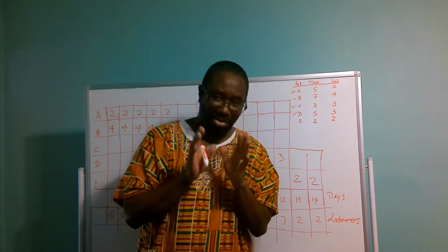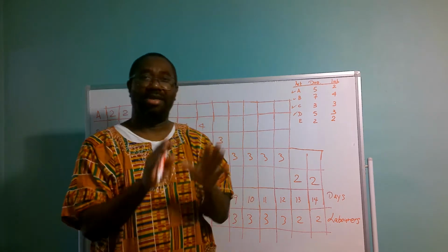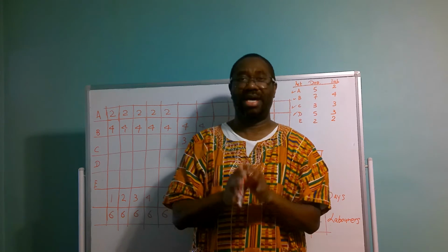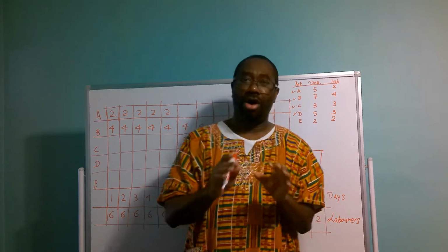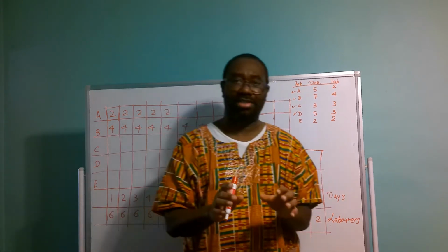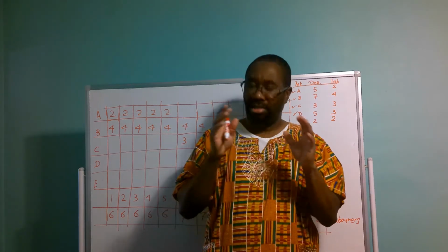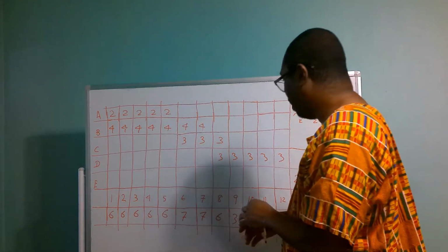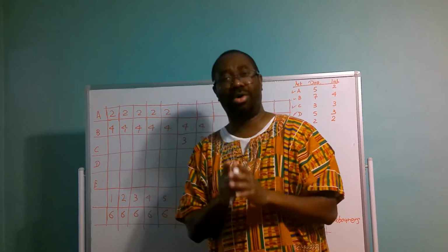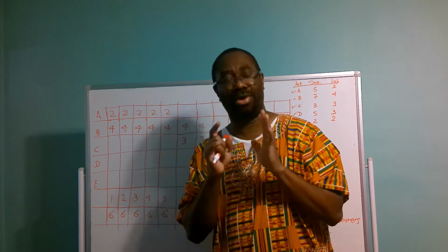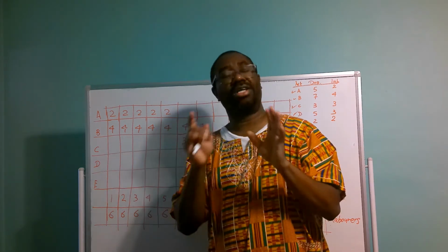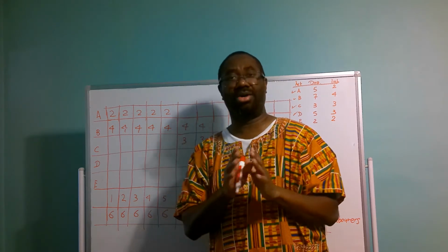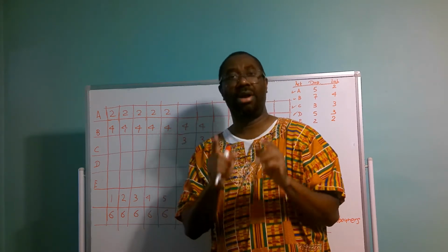But what you must understand, and if you go back to the beginning of my presentation, I did say to you that in order to minimize costs, the contractor came up with the notion that he is not going to use more than 6 laborers per day. The contractor came up with that based on costs and whatever factors, and is not going to use more than 6 laborers per day.